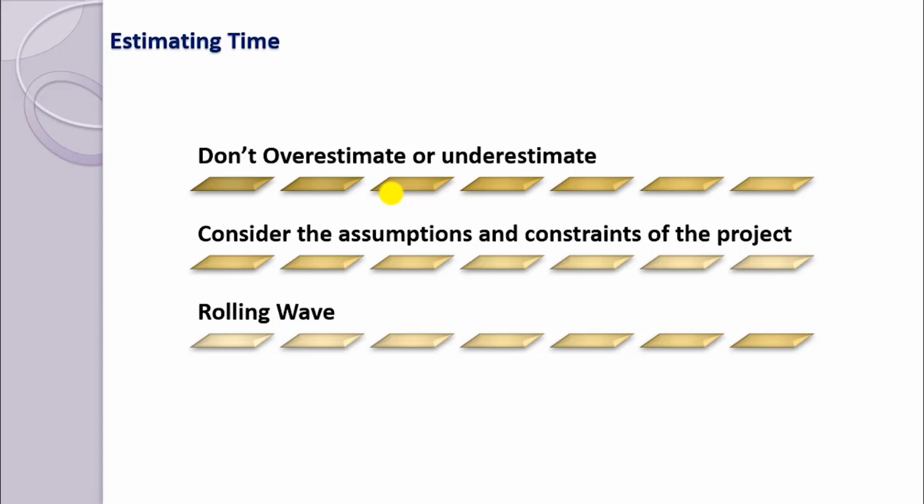A few averaging techniques are available. You can choose the one you prefer. The options vary in complexity, but two simple equations are these. You choose the most optimistic estimate and the least optimistic estimate and divide the sum by 2. This is just the average of the longest and shortest estimates. You can get your expert leads doing the estimation and take this average. Or there is a second equation: the most optimistic estimate is added to 4 times the most likely plus the least optimistic, divided by 6. This gives extra weight to the most likely estimate.